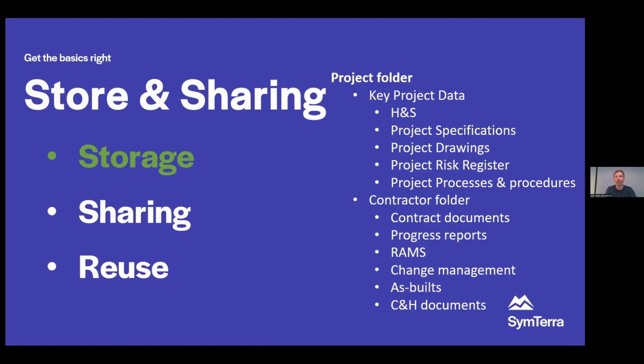I just kind of outlined there on the right-hand side a project folder structure that you could use. It's not perfect, but it's a start. You have your key project data folder that we share to all people on the project. It's read-only, so nobody can change it except for the owner. Health and safety documentation, project specifications, drawings, your project risk register, and also your project's process procedure. So everybody is starting on the same hymn sheet and understands why different things are going on.